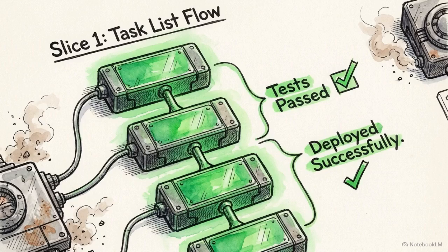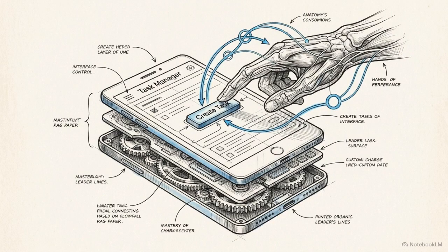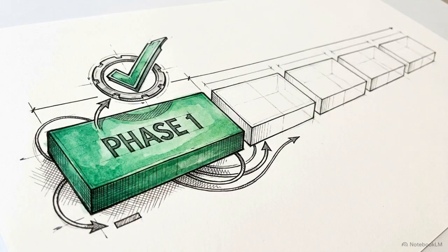A slice only reaches the standard of done when it is thoroughly tested, documented, and structurally safe enough to support the next layer of complexity. When you finish a vertical slice, you secure a functional, deeply reliable core system that locks firmly into place. This creates a direct practical benefit. You have visible, working software early in the development cycle, which makes progress tangible and easier to measure.